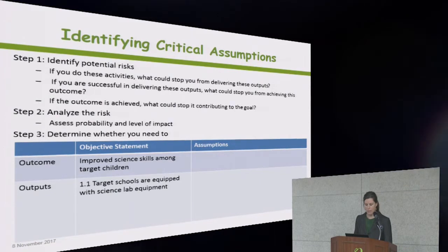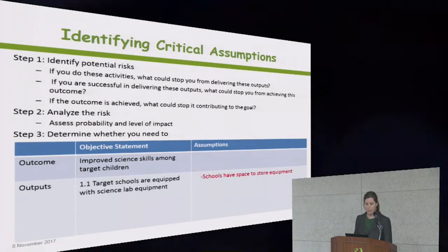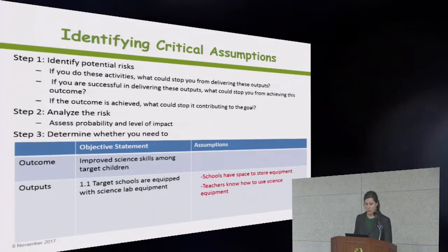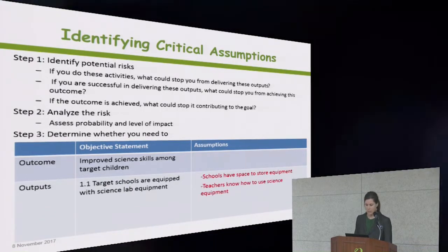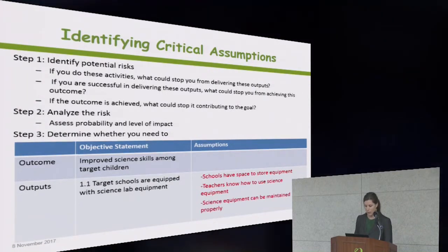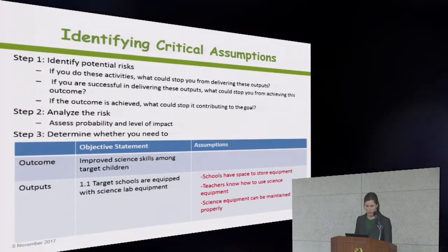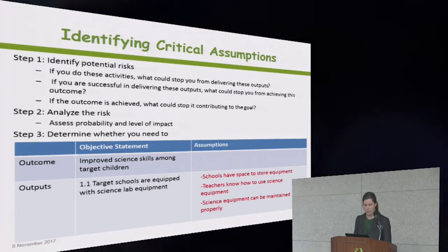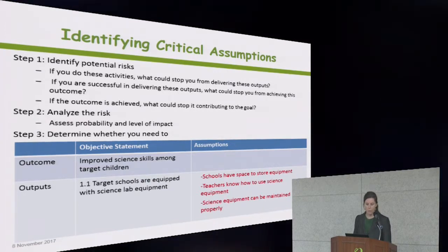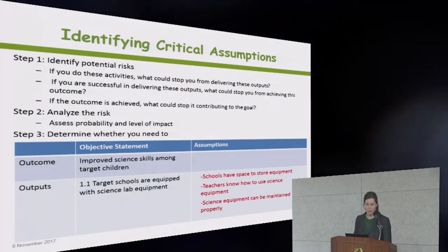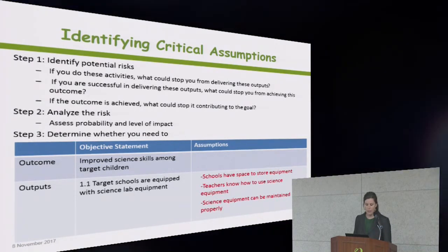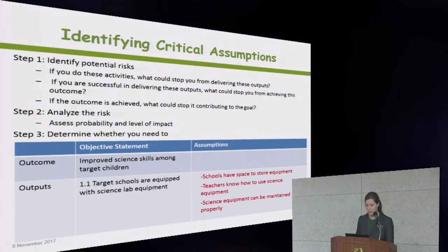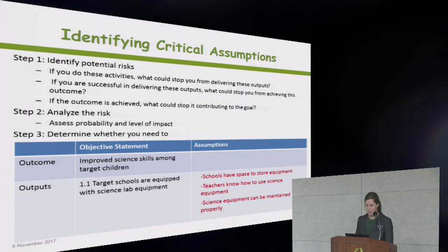Well, we're assuming that schools have space to store the equipment. And we're assuming that teachers know how to use the equipment. And we might be assuming that the equipment can be maintained properly. So without these in place, our achieving of the outcome is questionable.